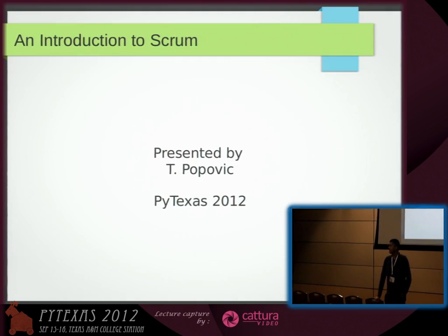There is a different way of doing it, but it's more what teams prefer to do. As you go forward, and you've done a lot, how long is your iteration? Is it 2 weeks or 2 weeks? So you have a lot of experience. One thing you can do is actually not take as much, so kind of plan for room for unexpected events or maybe incorrect estimates or things like that.